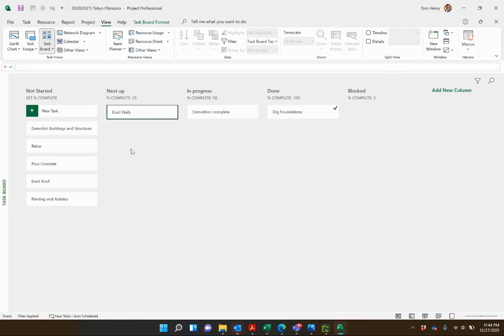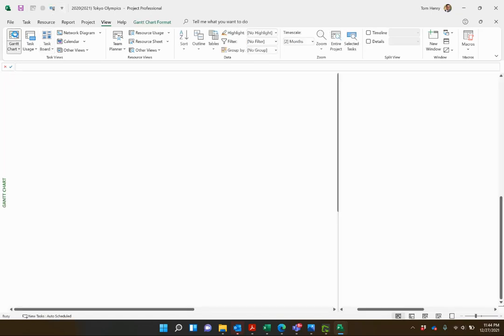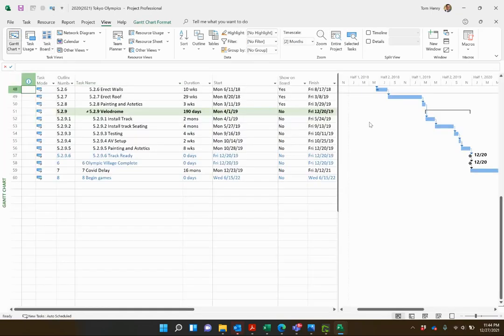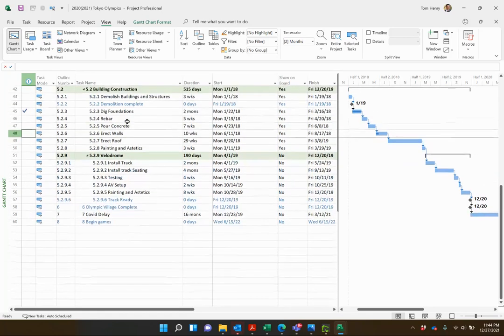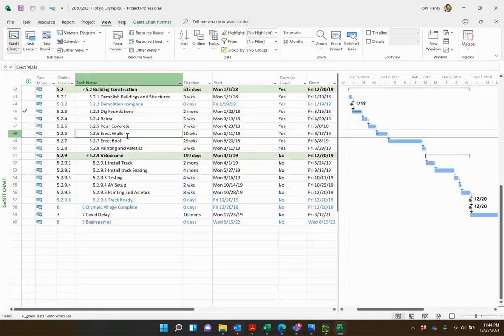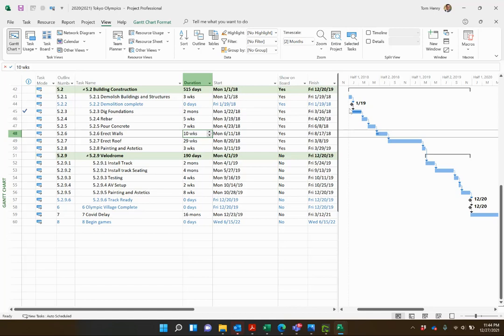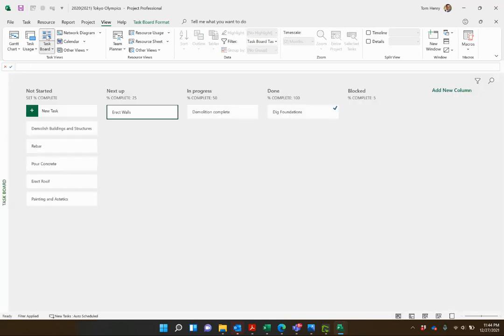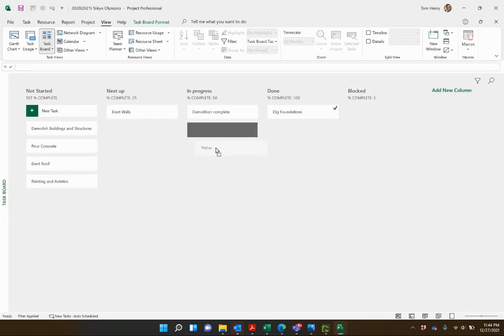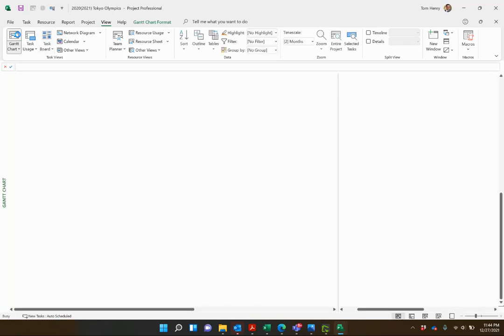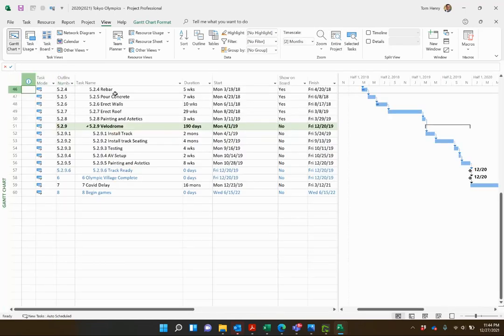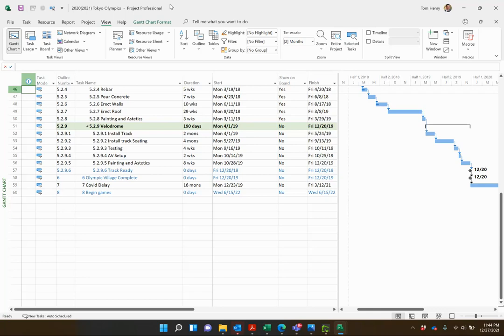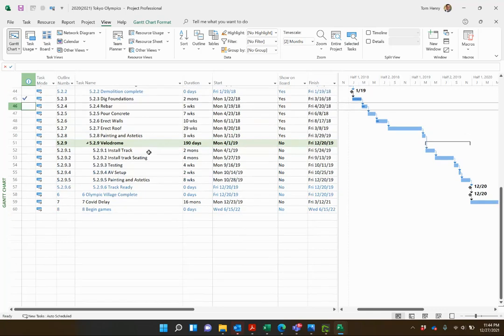You see how Microsoft Project makes this interaction seamless because we've got agile and waterfall going on together. Go back to my Gantt chart. Maybe I want to say it's 10 weeks. I can increase durations, assign resources. You can see this will actually be updated based on the information that's being shared in the task board. 50% complete for rebar. Let's go back to the Gantt chart. Boom, 50% complete on the rebar. So we're seeing the progress, we're getting the best of both worlds right within one interface.